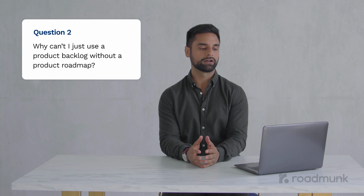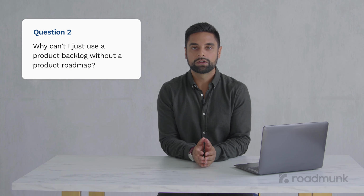So the second question is, why can't I just use a product backlog without a product roadmap? Well, when an organization is really small, they are actually synonymous. But over time, the roadmap is going to describe the why of what you're building and the customer value, and a little bit of the what. Where a product backlog is going to start to have all of the what and contain a lot of information that the organization may not just understand. And so it's really important that the product roadmap describe that customer value and your product backlog be all of the details of how you're going to complete that vision.